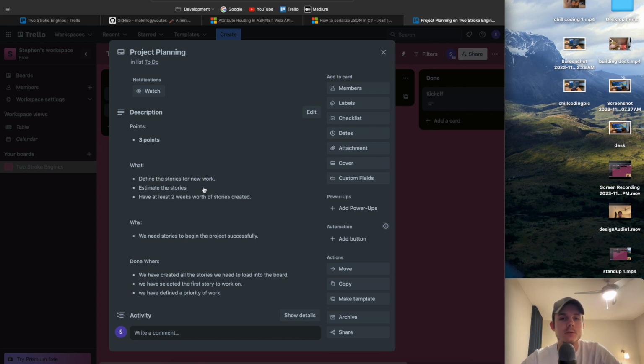Define the stories for new work, estimate the stories, and have at least 2 weeks worth of stories created. It sounds like a lot, but I think once we start to actually create the stories, you're going to see how this is going to take a while.